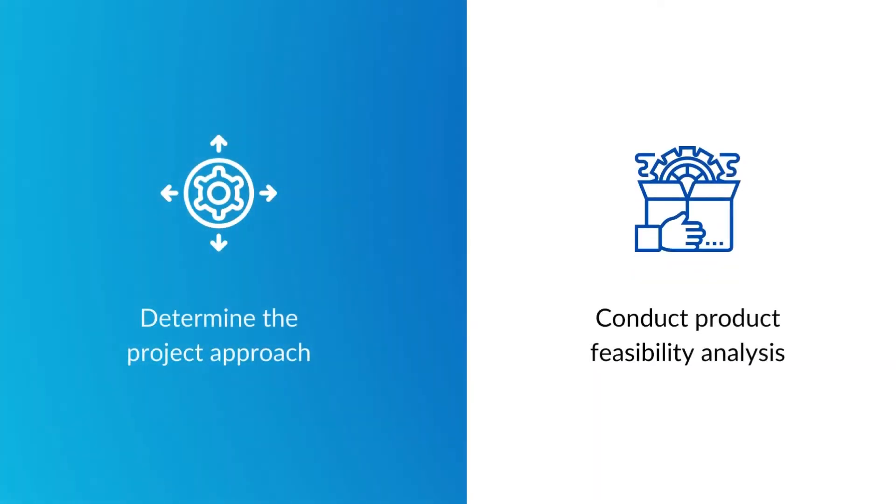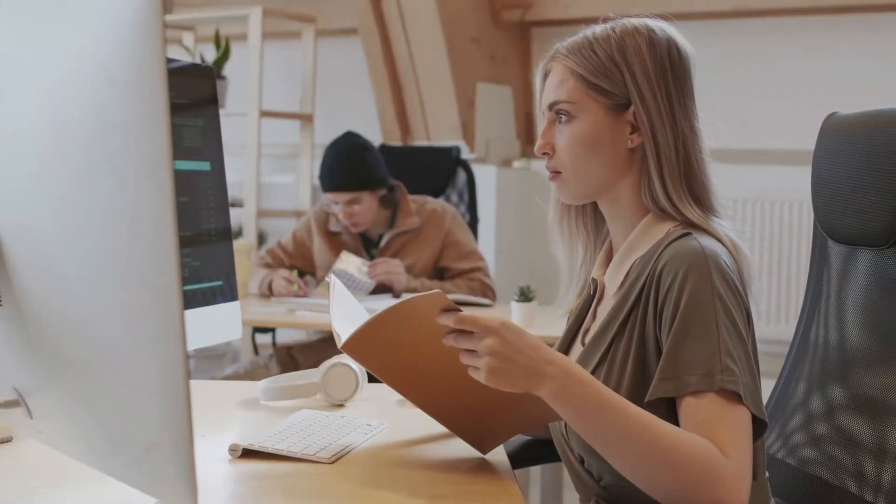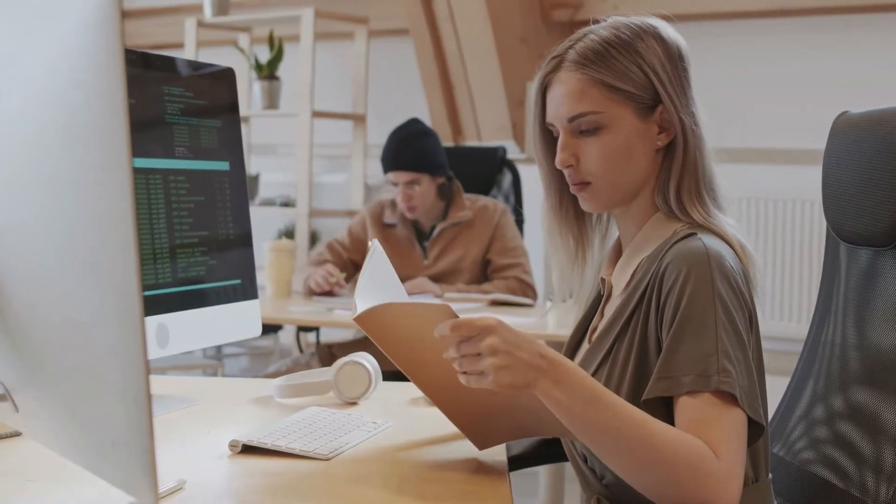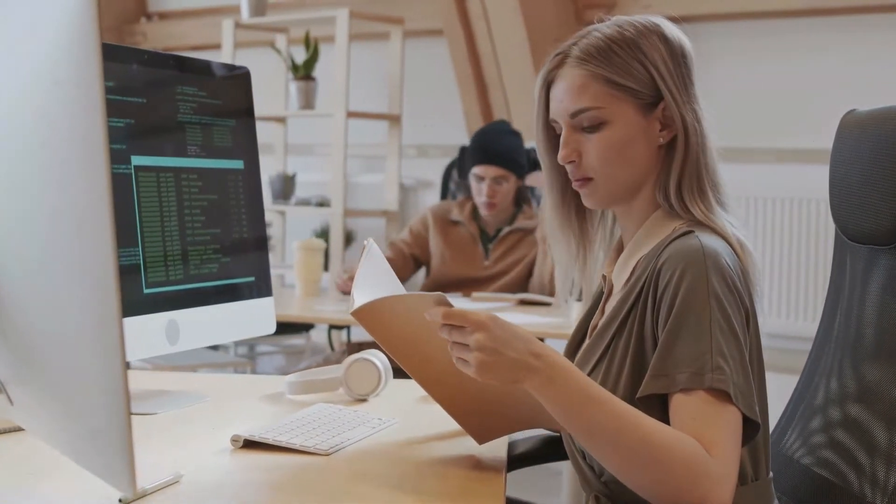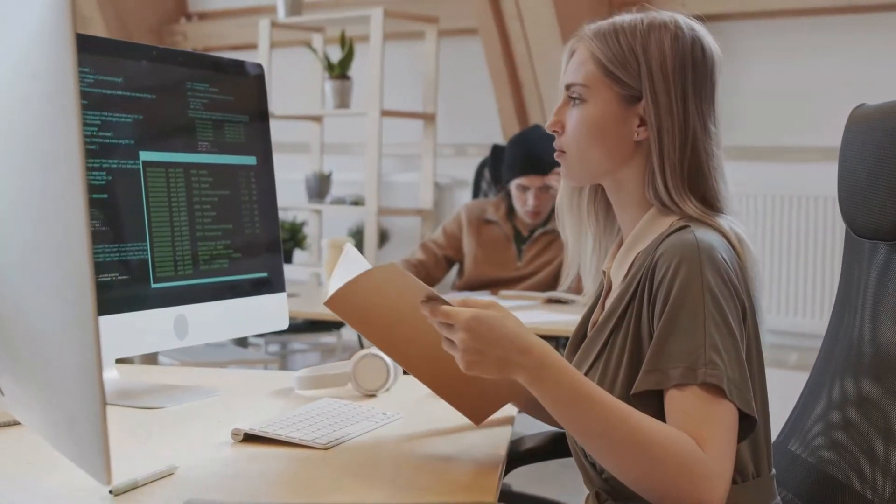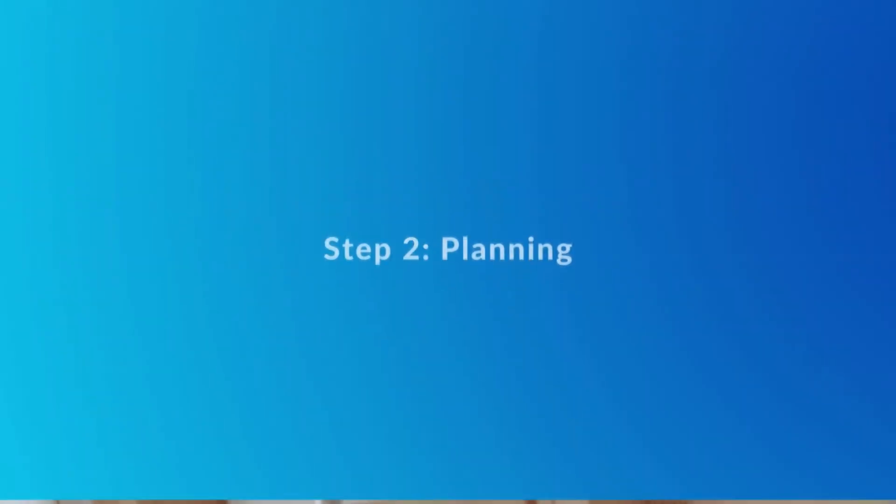Based on the analysis, the team will determine the project approach and execute a product feasibility analysis from technical, operational, and financial aspects. All of this will be documented via a software requirement specification, SRS, which will then be used as a point of reference for the next stage.